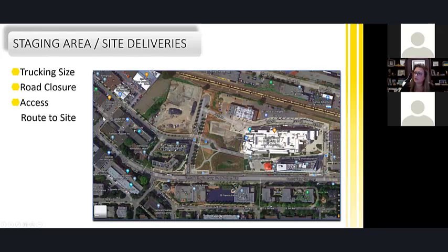And this is going to be temporarily closed for a duration of time. So those are things you need to think about. The cost of that gets very expensive. It depends on the city we're in, but this can be very, very expensive. So this was all adding to our costs of CLT when we're doing our cost analysis.